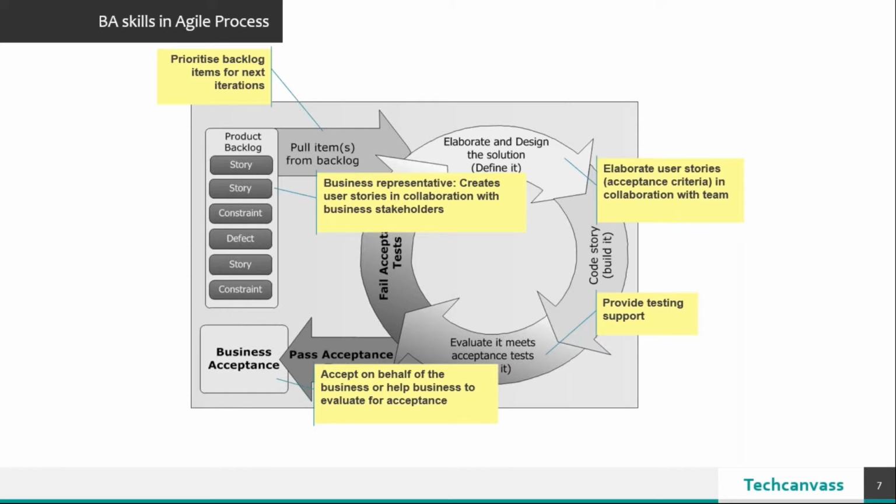For that, you can set up meetings with your stakeholders or product owners, depending on how mature your product backlog is, or how mature the project has been. You can set up the frequency: you can have it every 15 days, or if the project is new, you can even have it once a week. It depends on how stable your product backlog is. So have these kinds of prioritization meetings, backlog refinement meetings, to ensure that the backlog is prioritized.